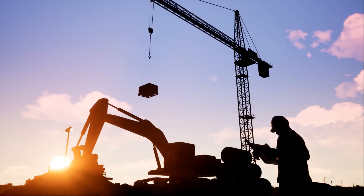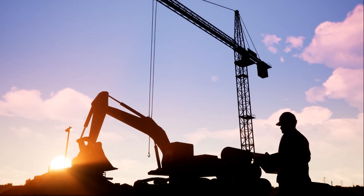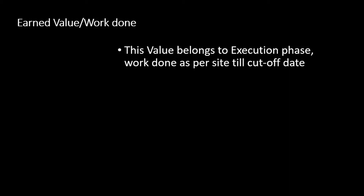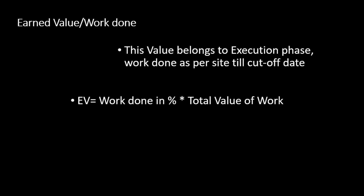The second terminology is Earned Value. Earned Value means the work actually done on site up to the cut-off date — in this case, 31st December. Planned Value belongs to the planning phase; Earned Value belongs to the execution phase. It represents work done as per site data up to the cut-off date, and all three parameters — Planned Value, Earned Value, and Actual Cost — must be calculated to the same cut-off date.